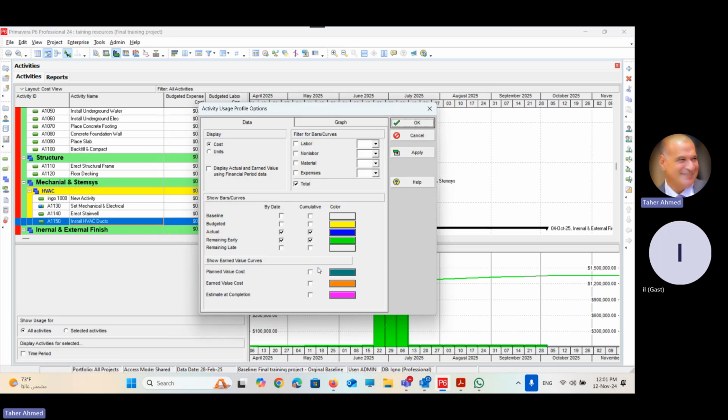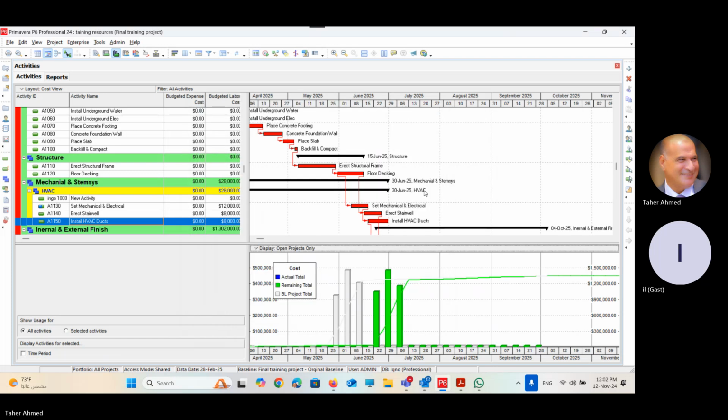If you want to compare with the S-curve, choose the baseline. Of course, you must create a baseline first. This project has no baseline, that's why it will not come up. This is how to compare. You have to create a baseline, as we said yesterday, and assign it to the project in order to compare later on. Okay. Here the project has a baseline. This is the comparison. Here it is. You can notice it.